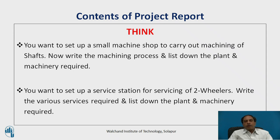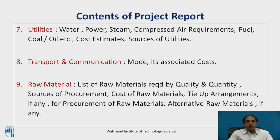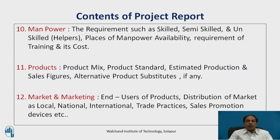For example, if you are setting up a small machine shop to carry out machining of a shaft, you have to write down the machining processes and list the plant and machinery required. Other contents include utilities — water, compressed air, road, light, power, transport and communication modes — raw material availability, cost of raw material, type of procurement, manpower required, and products, market and marketing.